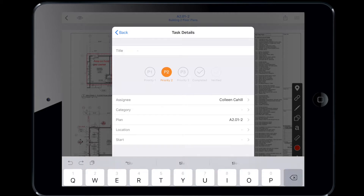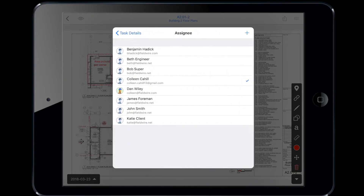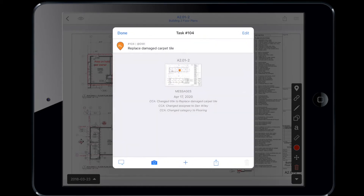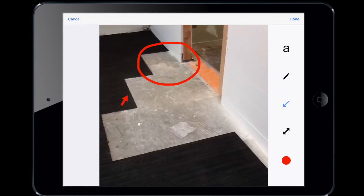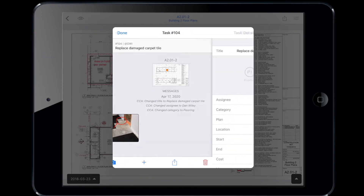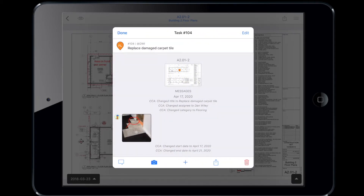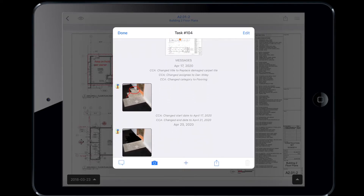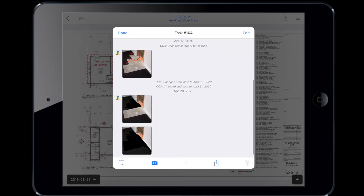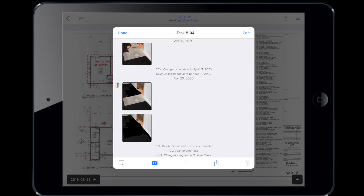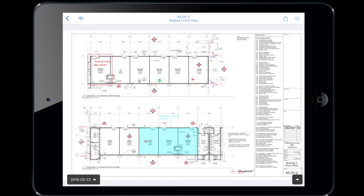I'll title the task "Replace Damaged Carpet Tile," assign it to my tile foreman Dan, and then put it in the flooring category. I'll take a photo and mark it up so Dan knows exactly where the issue is. Once Dan starts working on this issue, I'll update the start date and estimated completion date so my team knows about how long it'll take. Dan or I will take photos throughout the process to show the progress that's been made. Once it's complete, I'll add photos and videos to make sure the remote team feels like they are on site as well. I'll move this task to complete and assign it back to my PM who's working from home. To learn more about how you can use Fieldwire tasks for tracking deficiencies, check out this video.